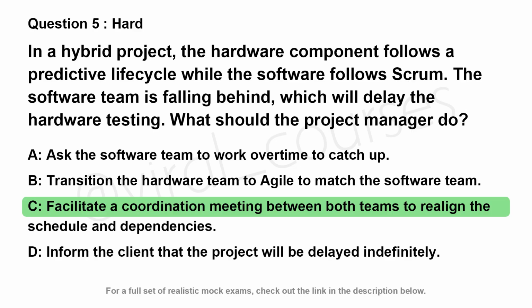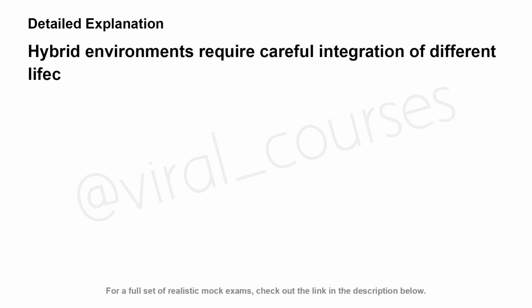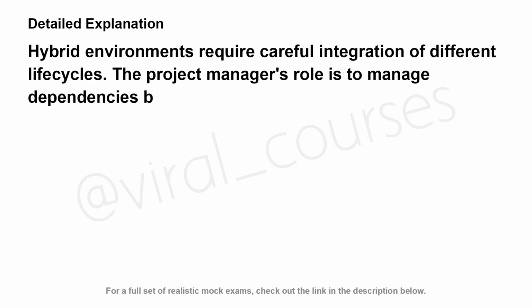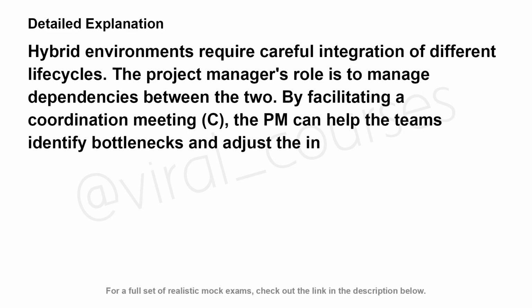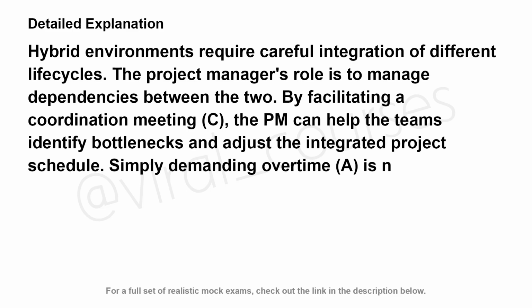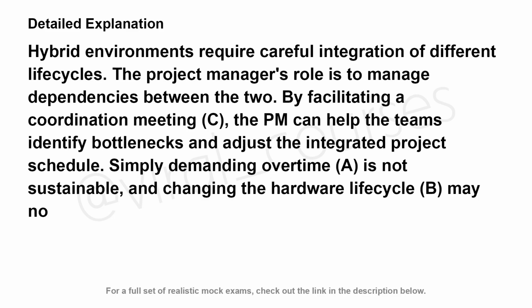The correct answer is C. Hybrid environments require careful integration of different life cycles. The project manager's role is to manage dependencies between the two, by facilitating a coordination meeting. C. The PM can help the teams identify bottlenecks and adjust the integrated project schedule. Simply demanding overtime, A, is not sustainable, and changing the hardware lifecycle, B, may not be technically feasible.